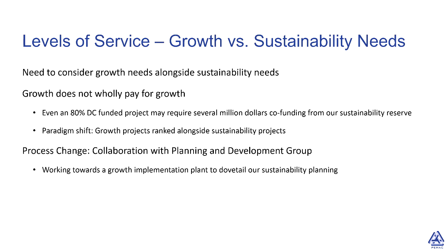This is a balance, so you can imagine if we want to be more affordable to our residents, if we don't get approved funding, that would mean we have less performance and more risk. If we don't replace a pump proactively, we could have a sudden failure, we could have basement flooding. Those are all risks and lack of performance. So with our 10-year plan that we developed, now we can show this kind of balance. We can show a sequence of projects, and by knowing the risk of any project and knowing whether it's deferred, we have an idea of the kind of risks we're taking on.